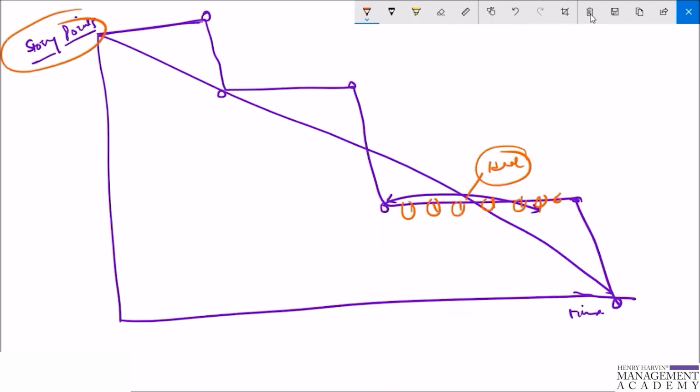But because the measurement unit here is the story point, we cannot display the time that is associated with the task, and which is remaining. So stories are particularly bigger items than tasks, and stories are also considered done only when all the tasks are completed, and this leads to stairs in the burn down chart. And such stairs are usually not evaluated correctly, and especially management reads them as no progress, while they mean effort continues. It has not been completed yet. So the steps could be smaller if stories are broken down in an appropriate way.